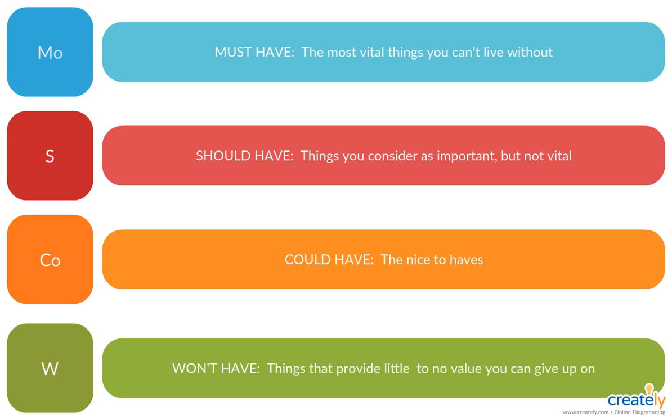Another thing I like about this is that typically we're talking about a project as a start date and end date, and typically we're working on maybe the first phase of something, and it might have multiple phases. So what I think of is these must-haves are what we have to have for this first phase of the project. And what I like about this is you can roll very easily into the second phase, and some of the should-haves might become must-haves for that phase. But at least you're maintaining a list, because this is a living, breathing creature that you're creating.